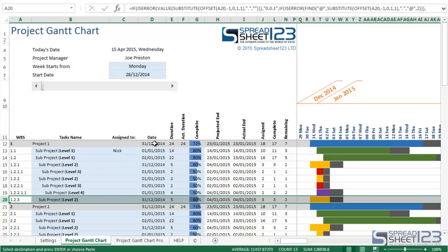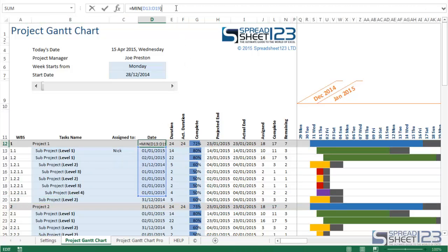But now our range hasn't expanded because it wasn't included between the rows that were within the range. So in that case you will need to go back to the project line and check every formula within that range. So what we need to do is change that from 19 to 20, which will include our new addition. So the same applies to the rest of the rows. Not all of them, but some of them.